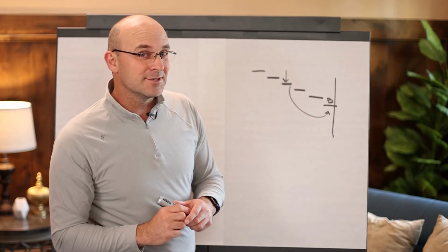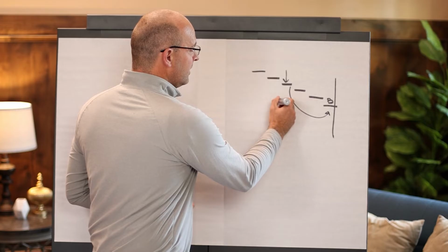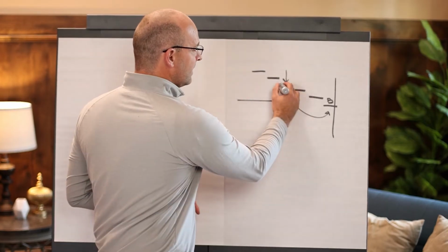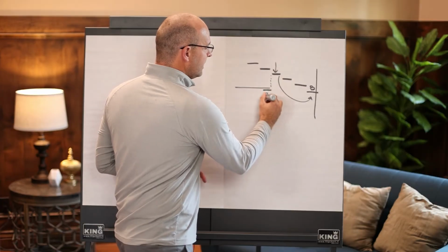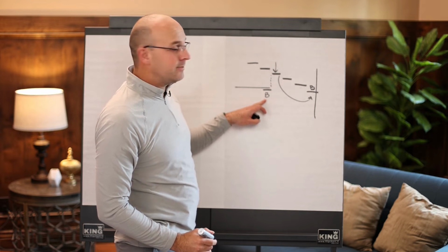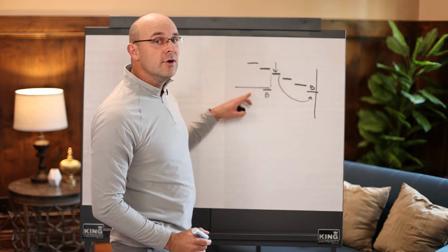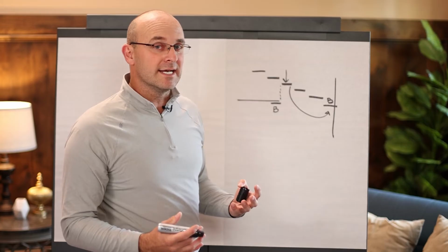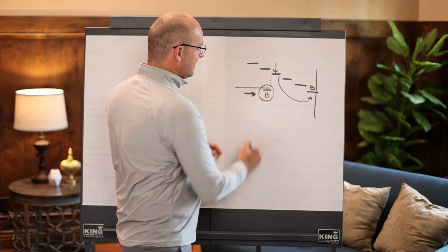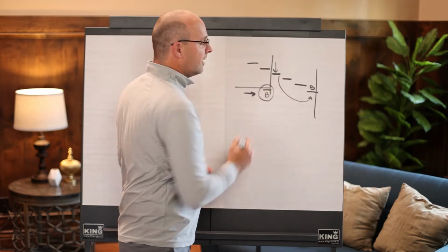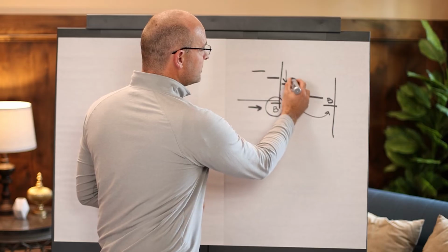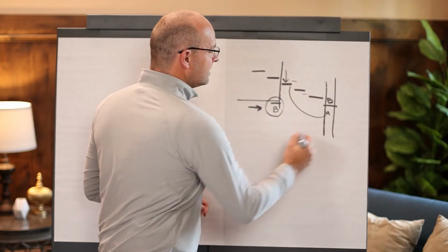The other thing that I want to talk about is that when you have supplies or resources coming to that activity to kick off that activity, you'll want a buffer here inside of that actual supply chain activity. So let's say maybe this is material or a crew, something that you need to actually accomplish that activity. You will want a buffer to be here in case this delays. It can still end up showing up here at the right time. Then if this activity delays, it will push the other activities and you'll eat into this buffer over here.